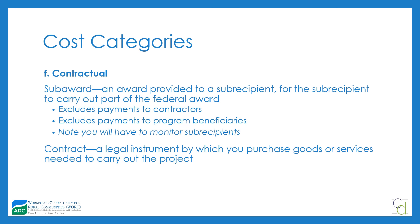Budget for the additional burden of subrecipient management in personnel hours. For contracts, include all funds for products or professional services and provide a brief justification. If you have contractors already selected, you don't necessarily have to have contracts finalized, but explain the selection process or other justification for why they're written into the budget narrative. For professional services, justify the necessity, appropriateness, and total anticipated time the contractor will spend on your project.